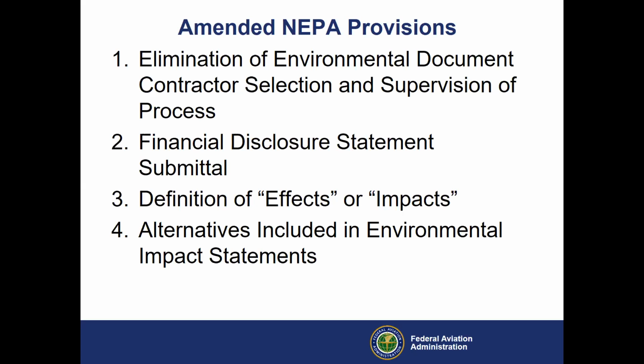In response to comments raising concerns about eliminating the definition of cumulative impact, the amended regulations require the description of the affected environment in EISs to include reasonably foreseeable environmental trends and planned actions in the area. As explained in the preamble to the amended regulations, trends determined to be a consequence of climate change would be characterized in the baseline analysis of the affected environment rather than as an effect of the action. So a lot to digest there. These are easily found on the internet, so if you want to read more, but yeah, this has been a point of a lot of contention.